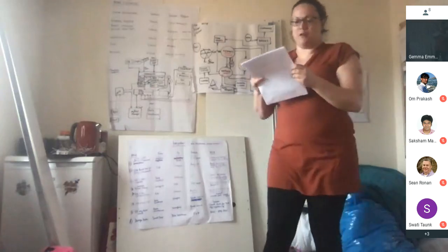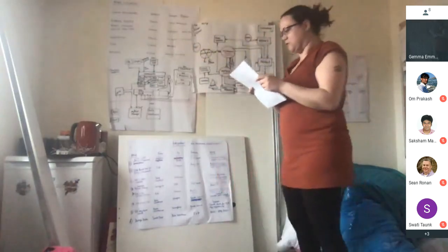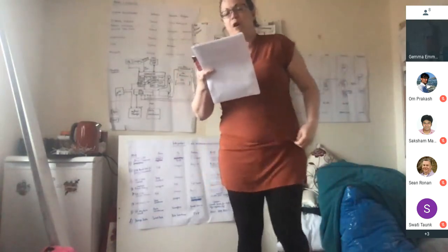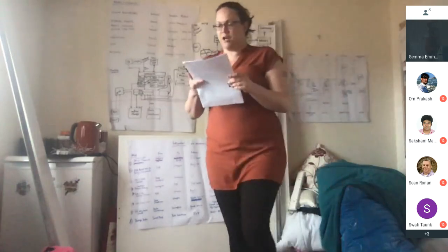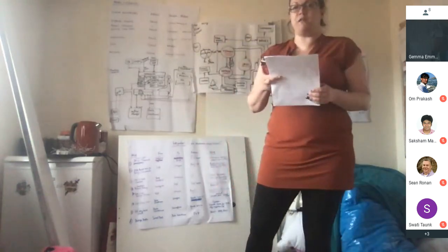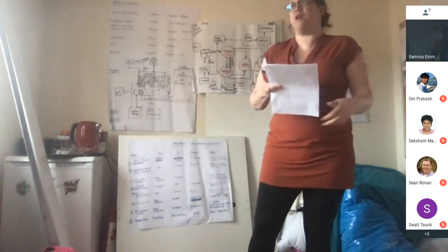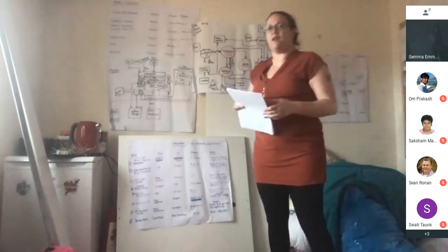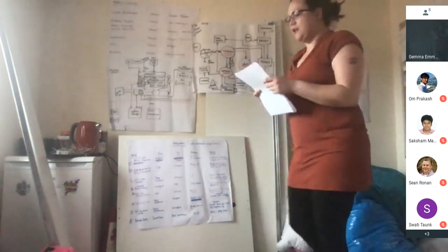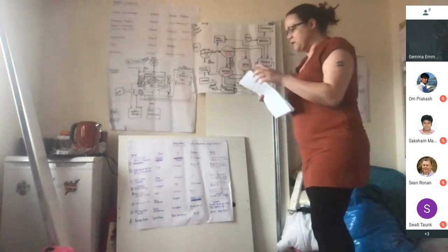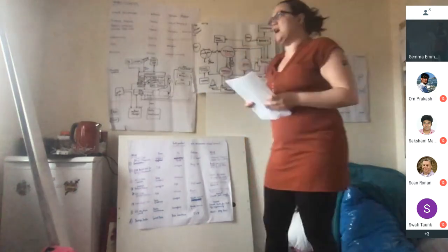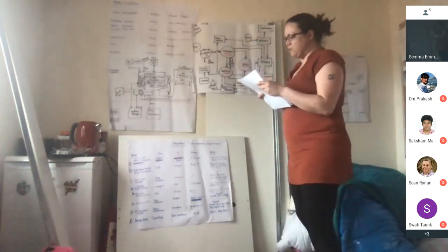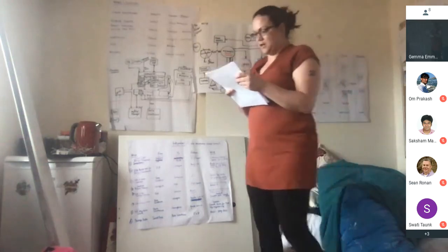So we have to make sure that we can nominate a product owner for those critical areas. We need to make sure we're tracking all our ideas and retaining them. So I recommend we use Jira and create epics in Jira, and each of the product managers are responsible for owning the process of refining the backlogs. Even if they nominate an individual product owner within their own teams who's a bit lower down and on the ground, they can actually take part in ride-alongs with users and come up with a backlog that's user-centric to ensure success. And obviously make sure if there's any duplicating ideas, they're merged together.